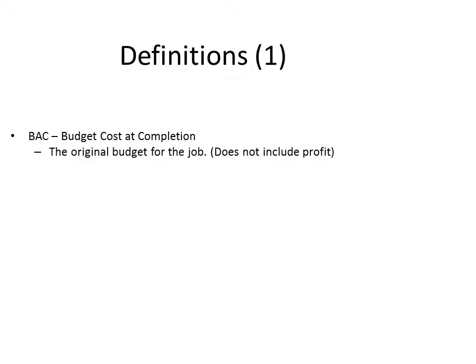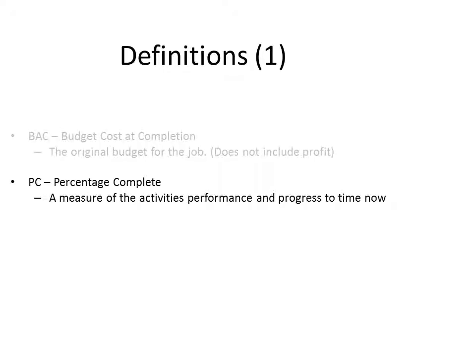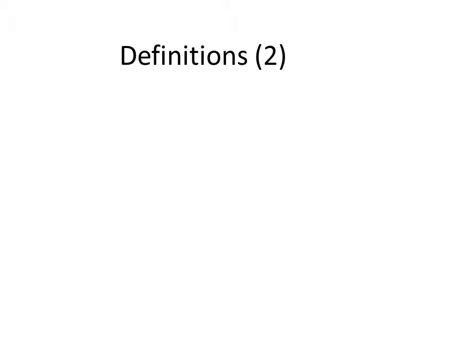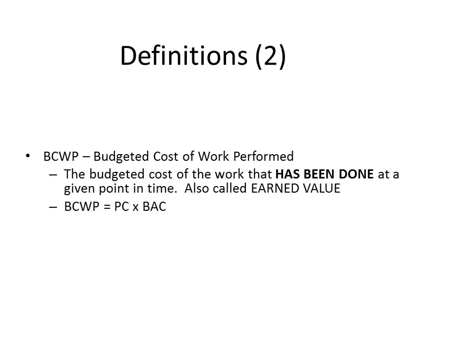Starting with key definitions: Budgeted Cost at Completion (BCAC) is basically the original budget for any job and does not include profit. Percentage complete is a measure of an activity's performance and progress to date. Budgeted Cost of Work Schedule (BCWS) refers to the work that should have been done at any given point in time.